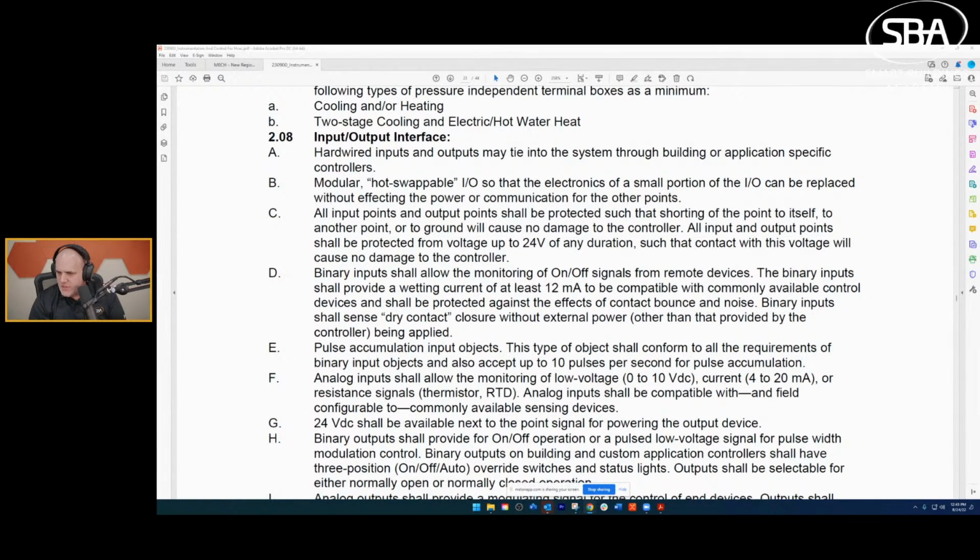As a salesperson, I found general conditions to be a source of grief or your best friend. Yeah, great catch there, Scott. I didn't talk about general conditions, but absolutely right, because general conditions, which are set as the general conditions of the contract, can override even your scope letters. So I've seen scope letters that say we're only going to do normal business hour work. And then the general conditions, which you're signing a contract, say that you're going to man it whenever it's needed. And all of a sudden you didn't estimate for 24/7 work, but you're expected to do that.